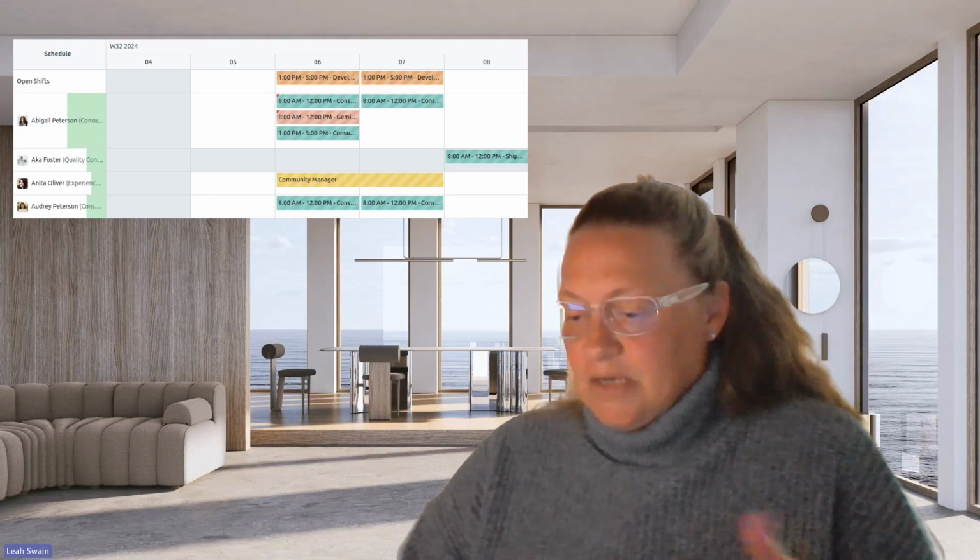accordingly. So what that means is, if you're grouping tasks by assignee in the Gantt view and you're scheduling for a specific person, it now shows only that user's unplanned events. So you don't have to filter through all the chaos. When rescheduling tasks and work orders, you get to choose to keep or use the buffer time in between them.